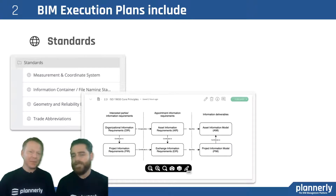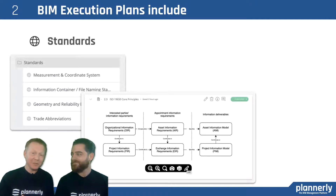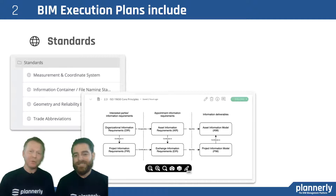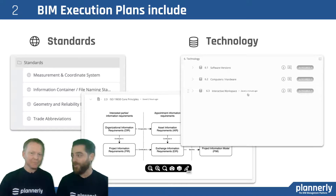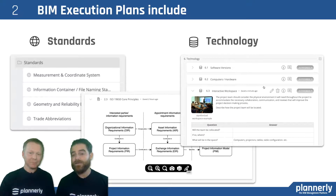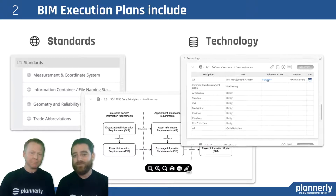Then we look at standards. Are you following the ISO standards — so ISO 19650? Are you looking at being able to define the same terminology so that everyone is on the same page? We highly recommend that you do that. What is an asset information model and how is it driven? What are the connections? How do you scope that and find out what informs it? Who are the parties involved and why? For someone who has managed multiple models receiving them from other companies and different team members, standardizing has helped so much because you're combining them into one platform for coordination. Standardizing the naming of equipment, piping, all the way down to the naming of files would extremely help — keeping everyone on the same page so you know where to find things.